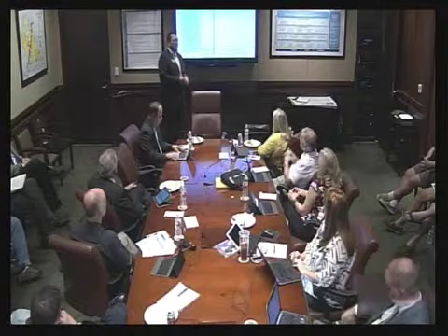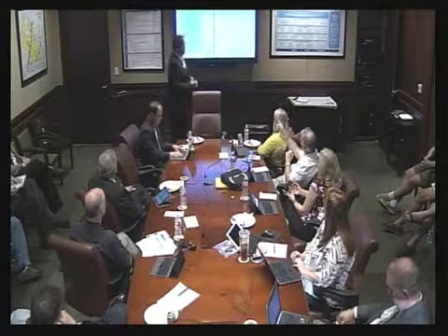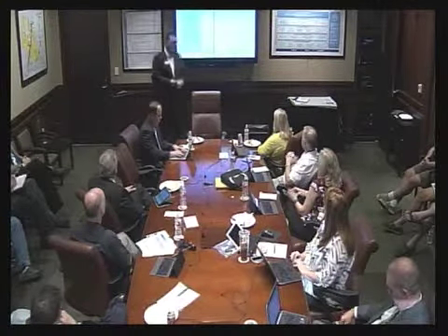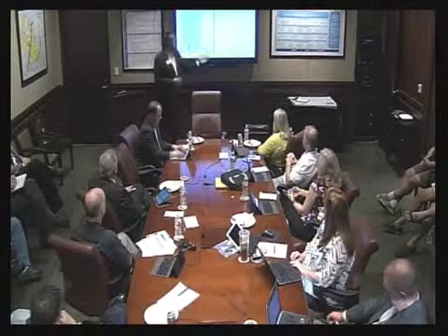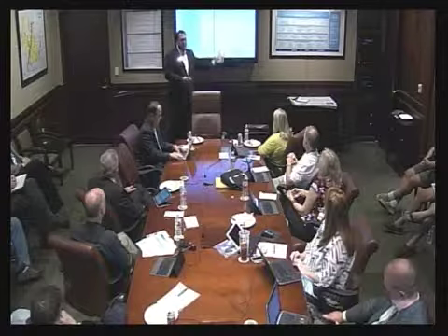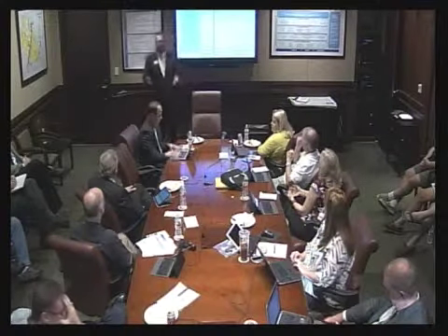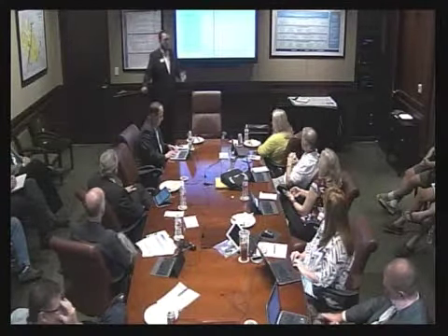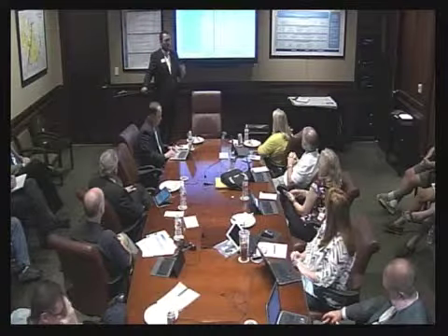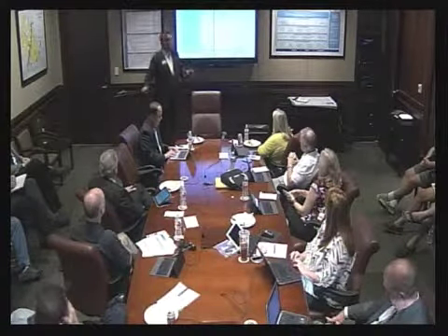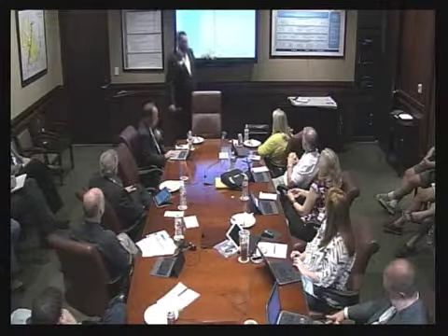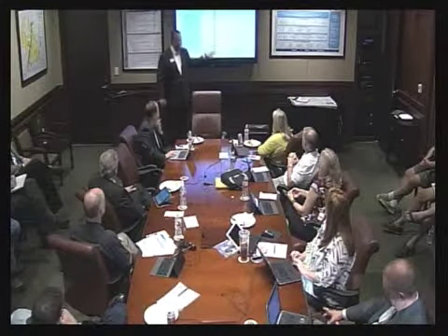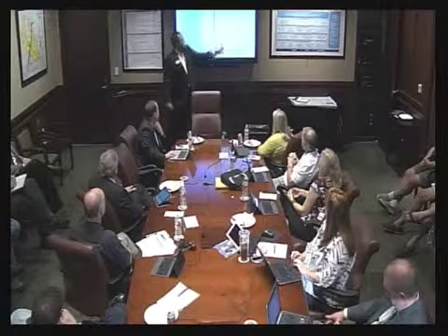Those are all the things that are included in that markup from the 12.5 million to the 19 million shown in that slide. And those can be included in a full depth. We're doing something similar, I believe, with the conversation we had about Pleasant Run, which was to do the full depth reclamation with some selective design improvements, drainage improvements, as well as the trail. So we can do the full depth reclamation with the other components added, but for comparison purposes and for the dollars shown here, there is nothing included in the full depth reclamation column other than the full depth reclamation.